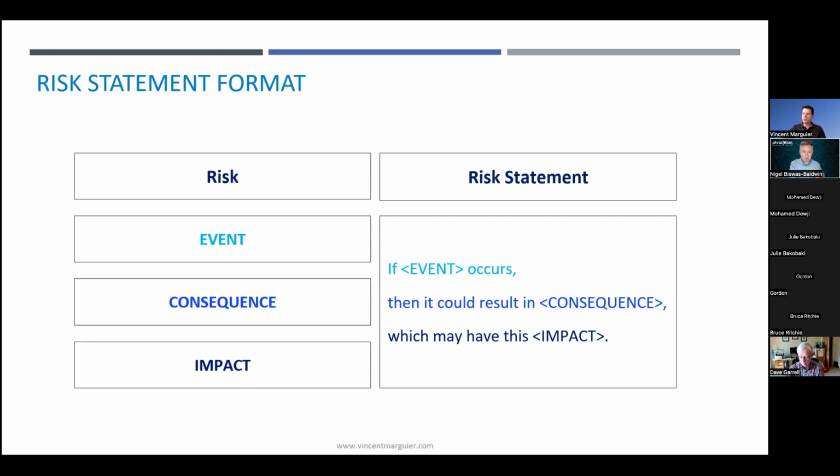If a person falls from a boat into the ocean, they may be bitten by a shark, which may lead to serious injury or death. So we have a different event here with the same consequence and the same impact, but that's still another risk statement. So really insist on the if-then impact formats, which will help the team formulate the ideas in a quick and easy way.